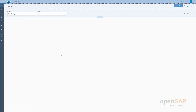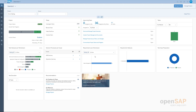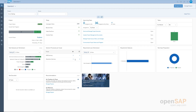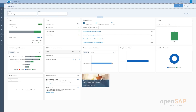Jumping back to the overview screen, we can see the full flow: we added a process to a scope, created a requirement against it, turned that requirement into a task, created a subtask from the task, and assigned the task to a sprint. This means that when we create requirements and generate actionable tasks from them, we can assign them to sprints and work in an agile way within SAP Cloud ALM. Tanya will now look at how to take our actionable tasks and requirements and move to the testing phase of the project.